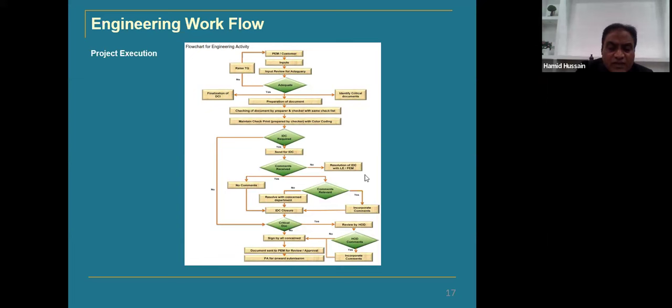And then the next phase will be the adequacy check. Once the IDC check is done, then we can go to the release of the documents to the concerned departments, and then to their counterparts, to the clients. And then critical documents, of course, will be checked by instrumentation or electrical or piping or their respective HODs. Otherwise, the lead engineers and team will handle this one. So like that, the phases of engineering execution will be done here.